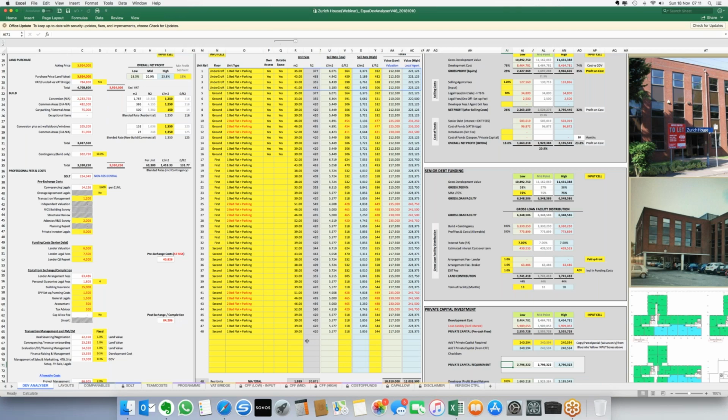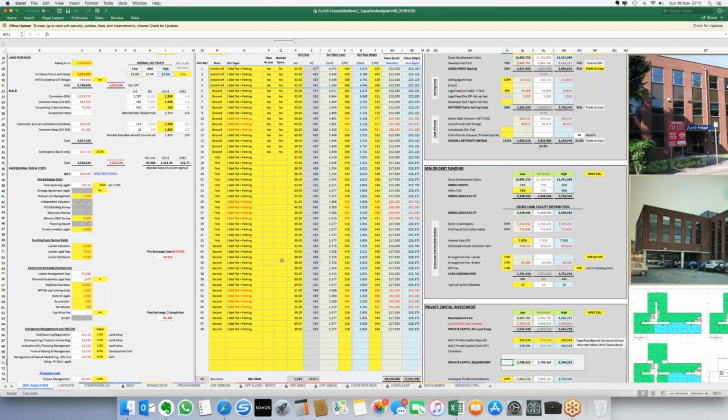So you're really engaging with the agent, and it tends to promote a very prompt response. But the key there is we want to know the sale value that is achievable, not the sale value that will be marketed, because this is generally higher than the achievable. Everybody likes to do a deal, don't they? So the achievable value is what we're looking for. So that goes off in an email, and that's working away in the background.